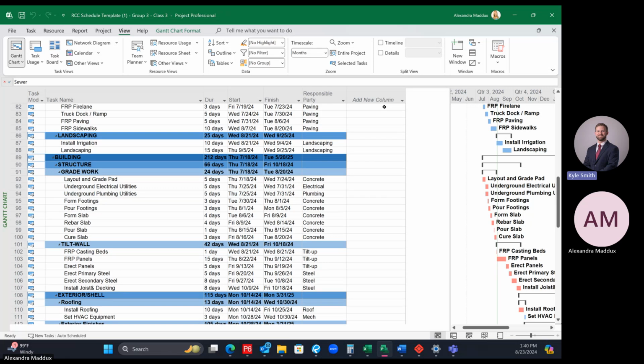Okay. Who's still working on it? You guys good? Are you ready to move to the next step? Okay, perfect. So now that we have it typed in, it is important to type all this in before we copy the building and make a building 1 and a building 2. That's why we want to get all this done before the tedious work, so you don't have to do it twice, because now all the codes we typed in are going to be in both building 1 and building 2.